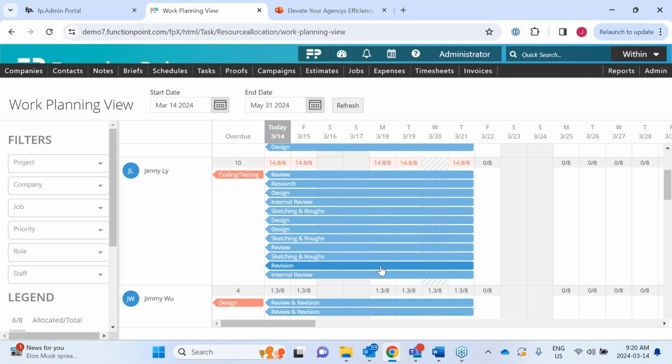Okay. And for tasks that span multiple dates, are the estimated hours divided evenly across the dates, or can we determine how the time is applied to each individual date? That's great. So currently, in its current state, they divide those hours equally across the dates. But what I'm going to show you at the end of the call with the enhancements, you have the opportunity to either front load or allocate evenly across the task. So we'll get to that later. Let's save that for the pops and popcorn.